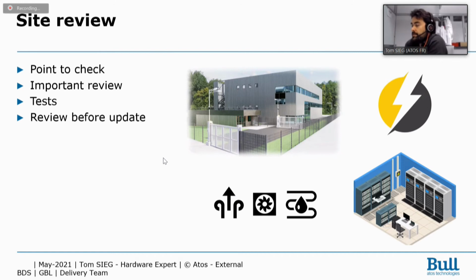Of course, if a data center was planned to, I don't know, get some Sequana water-cooled racks, you will have to check all of this to increase the capacity of the data center or to adapt it to be able to connect a direct water-cooled solution. And after all this work was done, you will be able to do a second visit and check if all the work was done correctly,